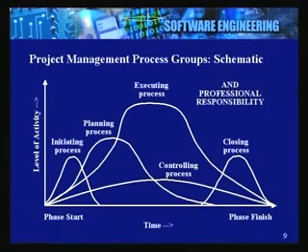So all the activities that need to be performed in terms of validating the proposal and getting the approvals and appointing a project manager and calling the meetings of the concerned people, allocating the resources, all these activities will have to be done during the initiating process and probably end up with a big kickoff, to say that the project has really started.